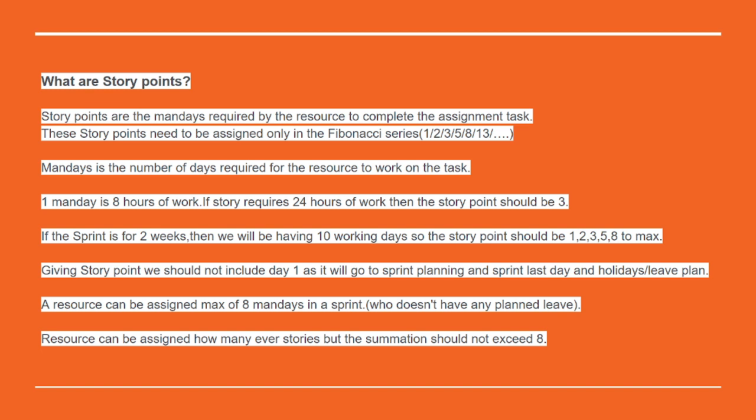A resource can be assigned a max of 8 mandates in the sprint if they don't have any planned leaves. I am considering the sprint to be of 2 weeks, so there are 10 working days, and in these 10 working days, day one goes for the sprint planning and the last day goes for the retrospective.